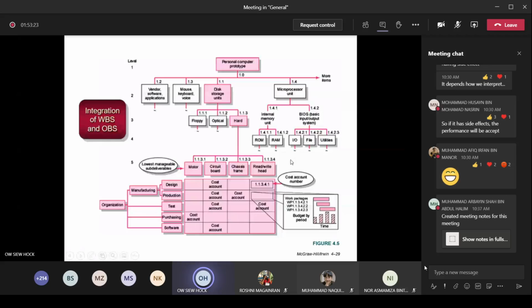It's just like my chapter guideline. I have sections 1.1, 1.2, 1.3, chapter 2.1, 2.2, 2.3, and so on. So you can break down the lower level. This WBS is like a breakdown of the numbering system. It extends the number, getting longer and longer. So that's the way. You draw the WBS and then you cross over with your organization unit, which department or unit is in charge of doing this task at the lowest level. The crossing point is known as the cost account.